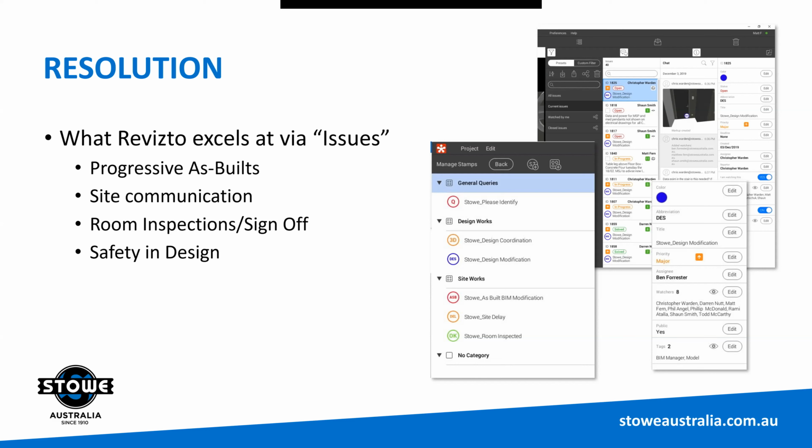The one lesson I've learnt, especially because we will use this internally and with other groups as well, is if you are creating stamps, put your business name at the front. It makes it much easier when you start to then work with others, because otherwise, if you've all got a coordination stamp, everyone's will look the same. So it's much easier if you want to copy a stamp template in, put your business name at the front. It makes it much, much easier if you're copying between.